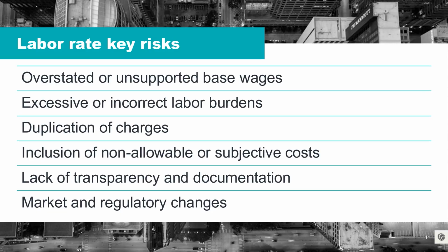Labor shortages, regulatory updates, or market shifts can impact agreed upon rates as well, leading to unexpected cost increases or compliance risks. Contractors may seek rate adjustments mid-project, or owners can even face penalties for non-compliance. So you will want to verify your contract includes provisions for rate adjustments that are tied to documented market or regulatory changes, and then monitor compliance throughout the project.